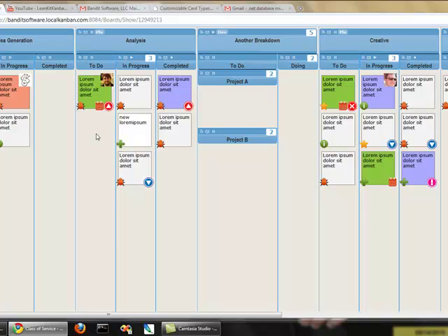Class of service is one of the more interesting features we've deployed with this latest release of LeanKit Kanban. The standard categories that we've provided by default are fairly common ways of categorizing work based on the cost of delay. But the sky's the limit as to what you can do with it, and we're very interested to see exactly what our users end up doing with it. So if you have any interesting stories about that, or would like to share the way that you've used class of service to manage flow and to manage risk and to evaluate the kind of work you're doing based on the cost of delay or some other factor, we'd love to hear those stories.